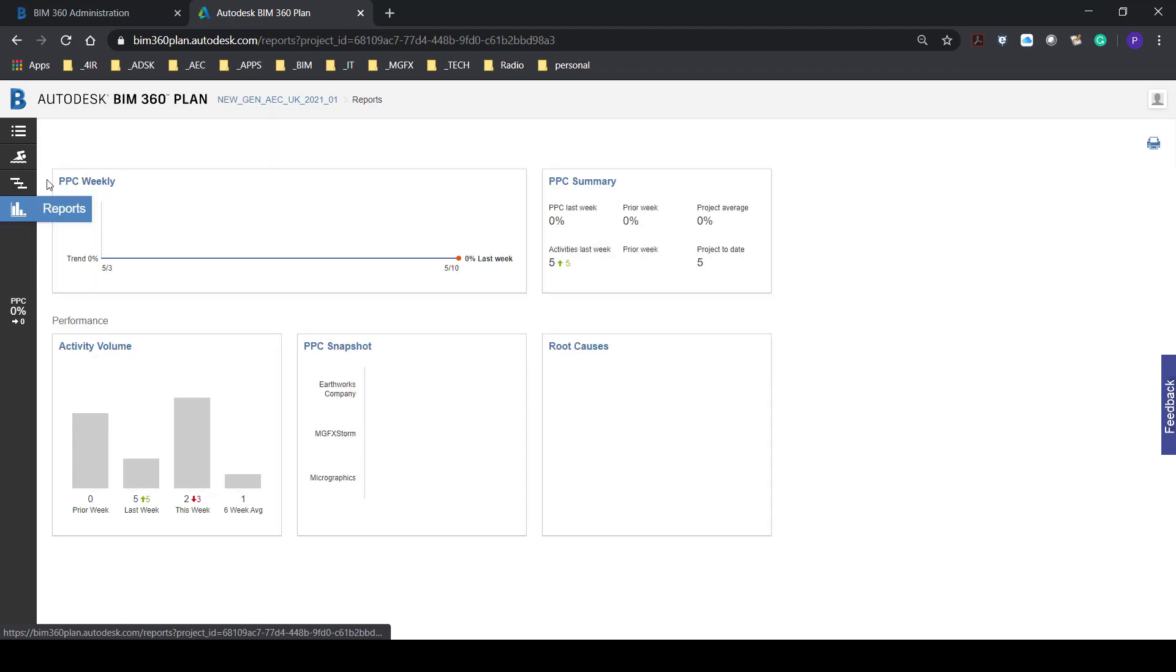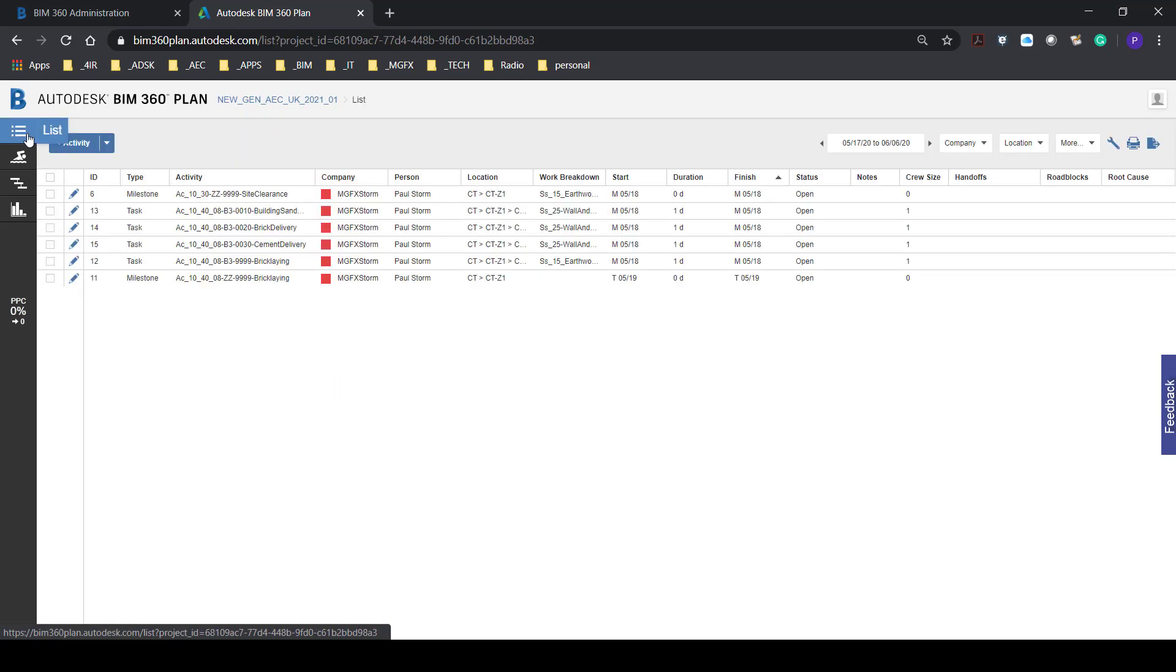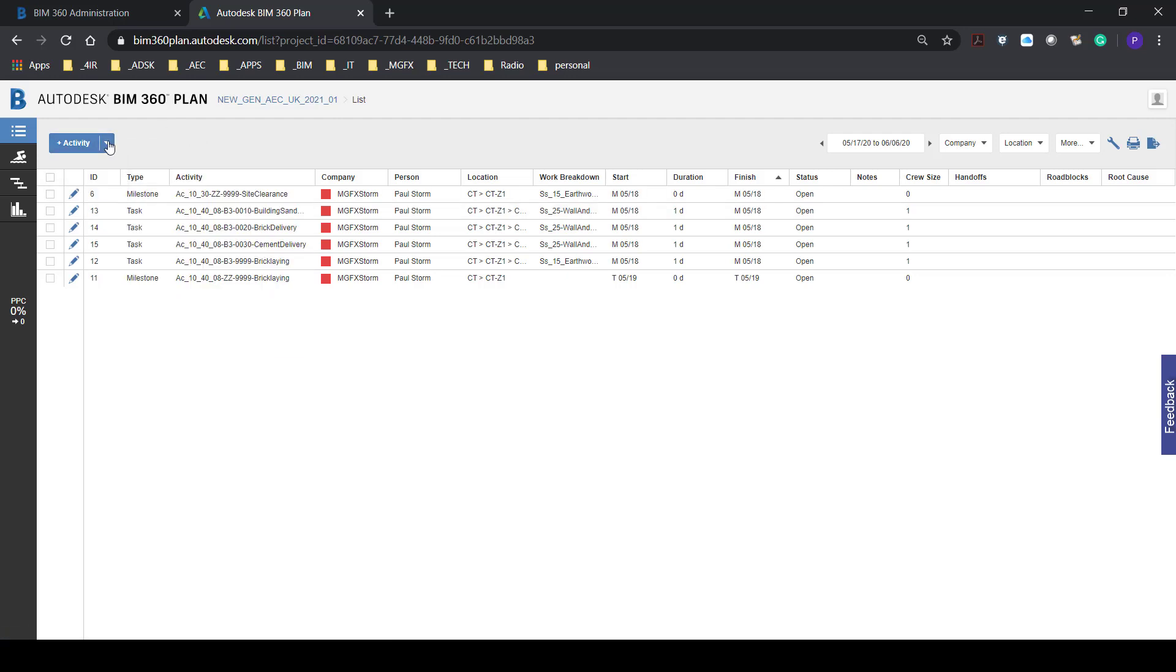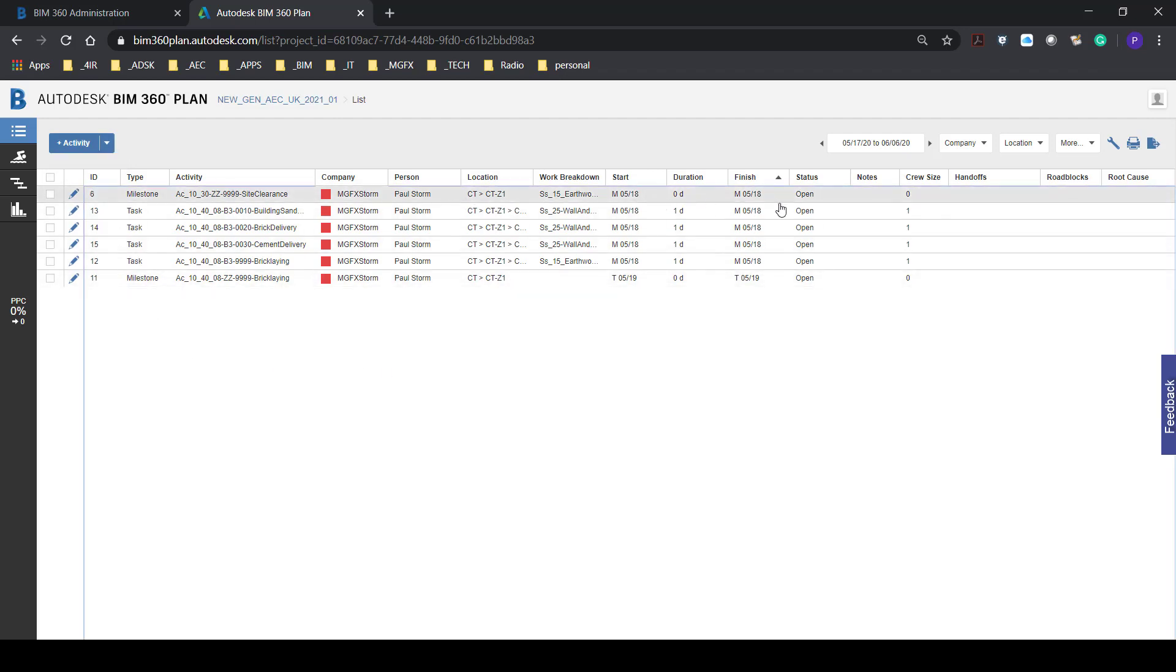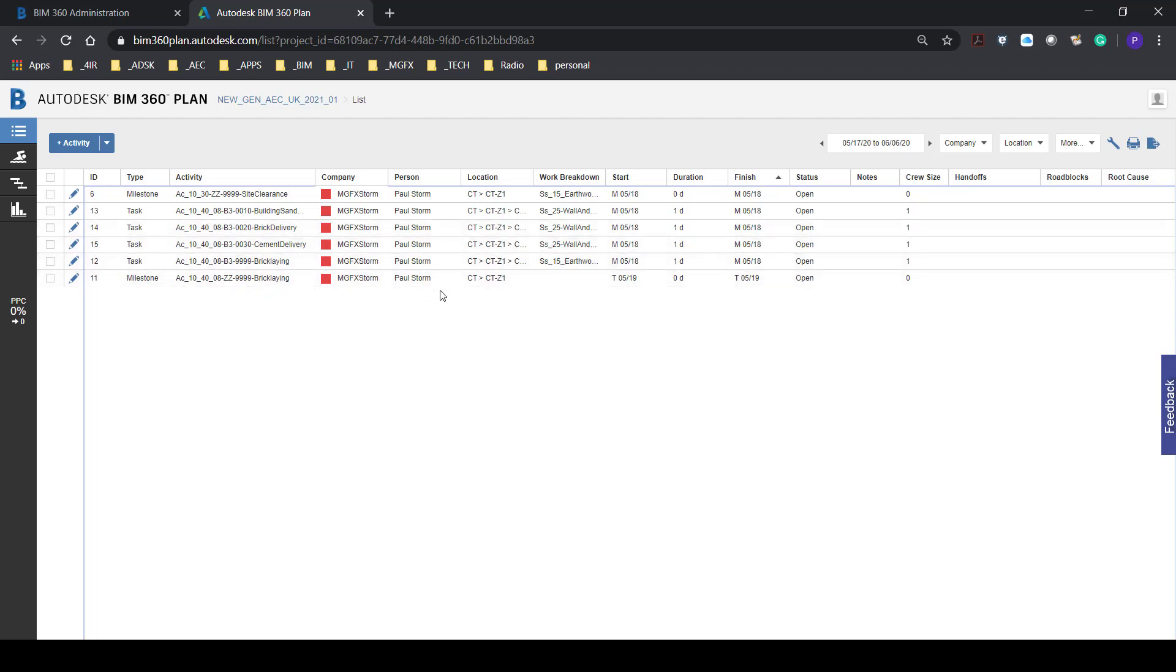So in essence this is how one would start by setting up plan the 360 Plan adding activities and one can even import activities according to an excel spreadsheet which is available for download so instead of going through the process of setting one activity up at a time you are welcome to do so in an excel spreadsheet as well.